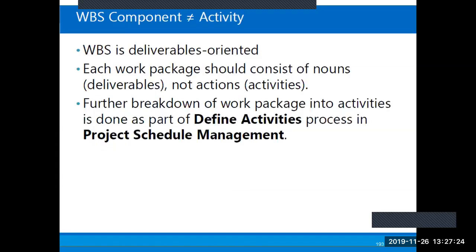Work breakdown structure component is not the same as activity. Absolutely correct. Because the work breakdown structure comes down, the last level is called a work package. A work package is the elemental, smaller portion of the work of the project that can be assigned to a project team member, and its characteristics are unique as a work unit.